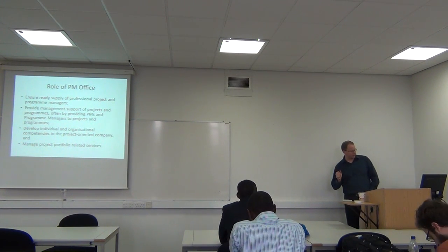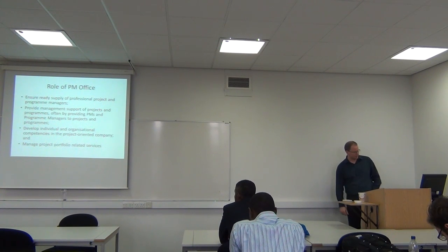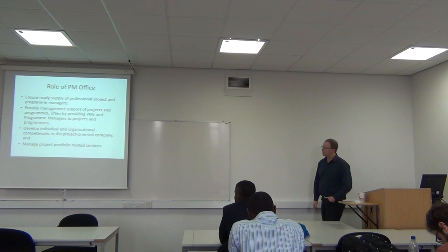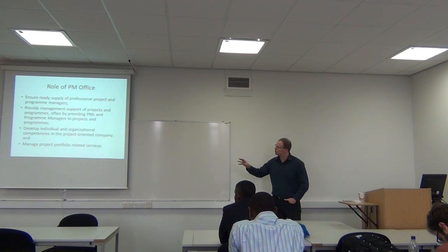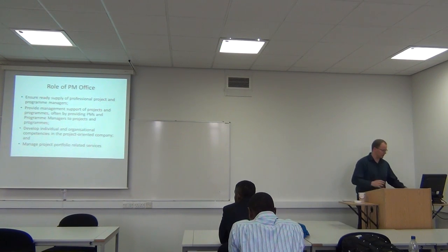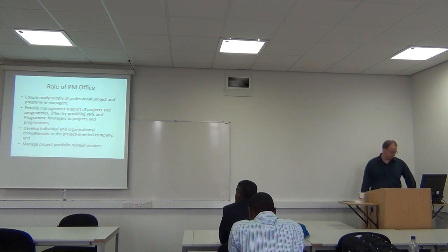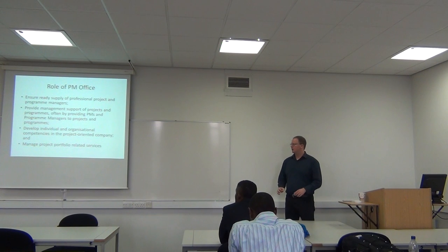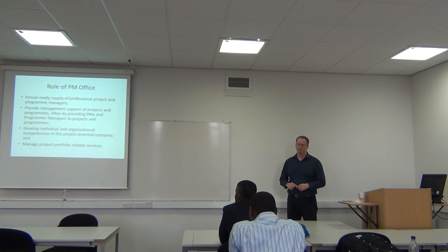Then develop, of course, individual and organizational competences in the project-oriented company. Here it's often as well that you try to build actually stronger links with your supply chain or preferred companies that you're working with. And then last but not least, manage project portfolio-related services. This is mostly reporting costings actually and KPIs to the portfolio holder. So this is literally the key role of the project management office in this position.